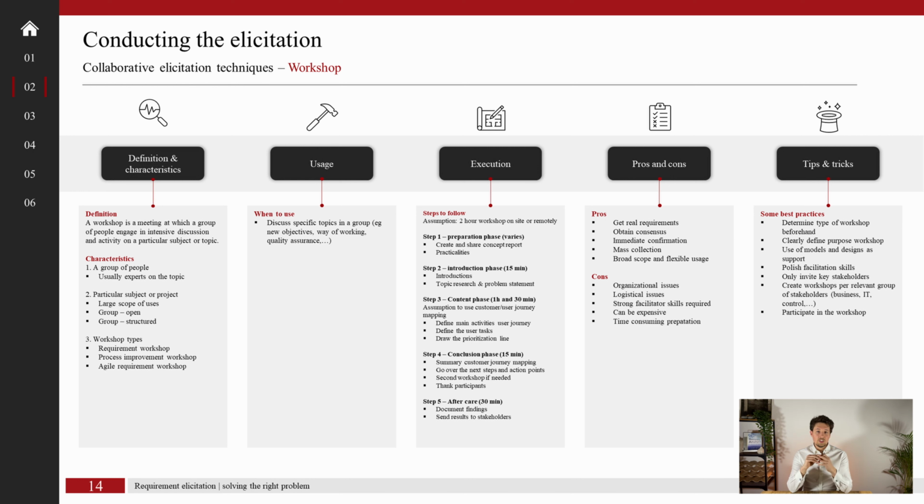The main preparation that needs to happen prior to the meeting is to have a clear definition of the as-is and the to-be situation. What needs are we trying to solve today, and how does the ideal situation look in the future? You should aim to have these two analysis deliverables prior to the meeting and share them with the stakeholders to fuel the workshop. This can typically be done by creating a concept report, but this falls outside the scope of this course. So the preparation phase can take quite a while if you take those aspects into consideration.